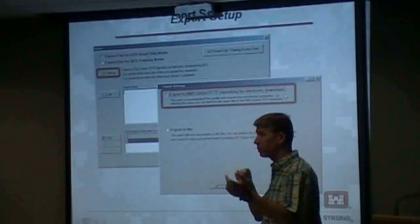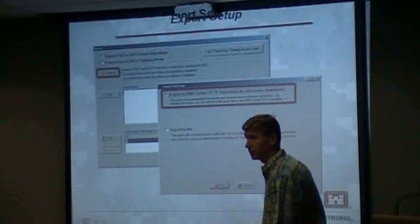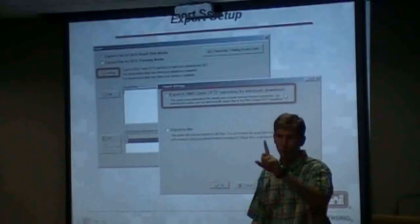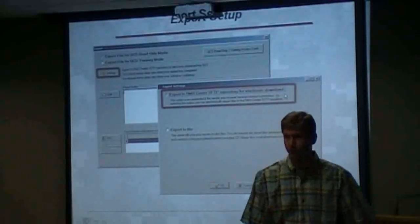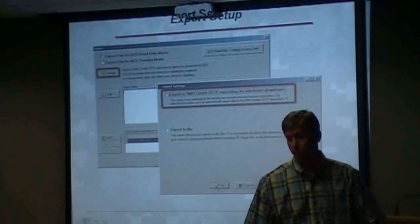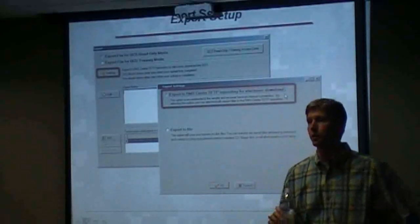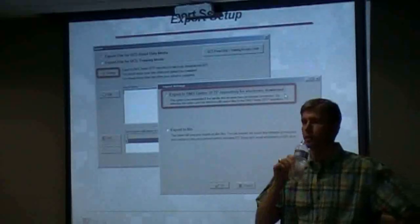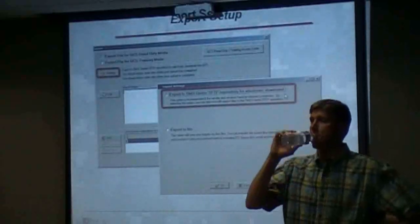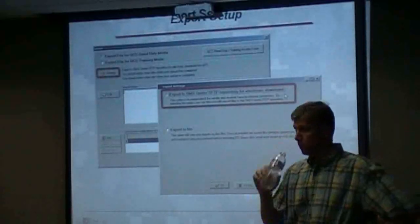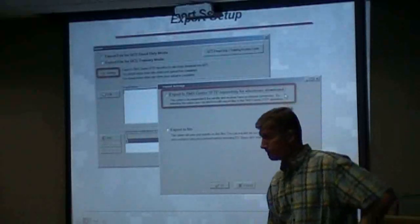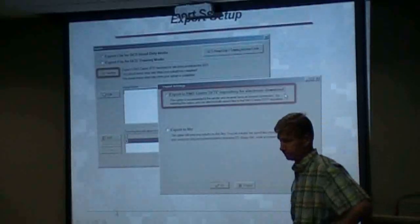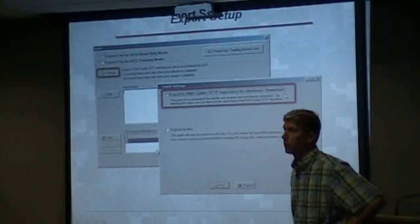Every time you import-export, you're taking a chance at something going wrong. How many master sites can you have? One. Only one master site, and that is the only site that communicates with RMS. That's per project — one master site per project.